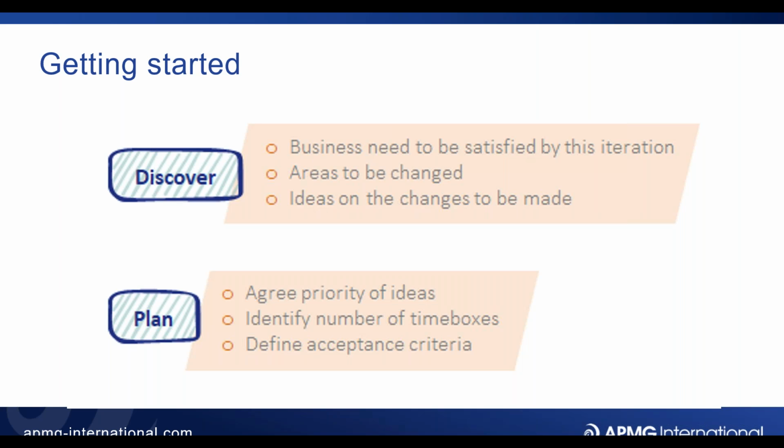And so when we come to the next step here of planning, and we're trying to prioritise how things work, real life examples of what might change are that there might be a sensible way of doing the technical work about what we code first, what we code next. But in this collaborative environment, the project team can see that something that they were planning to do later on in the iteration actually has quite a big effect on the business, in this case the accommodation unit, and is actually going to take quite a long time for the accommodation unit to get resolved. So they start to realise that maybe if they brought that forward into their plan, if they did that earlier, it would give the accommodation unit the time they need, that longer lead time that they actually need. And that seems to make sense.